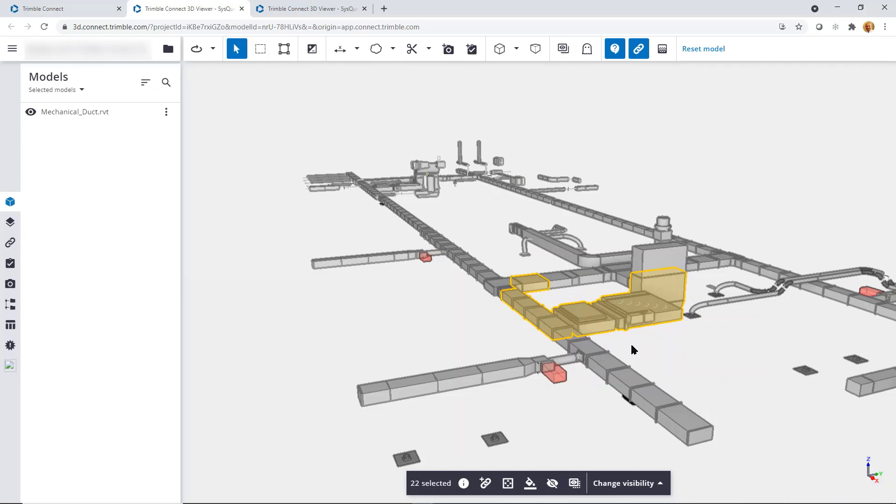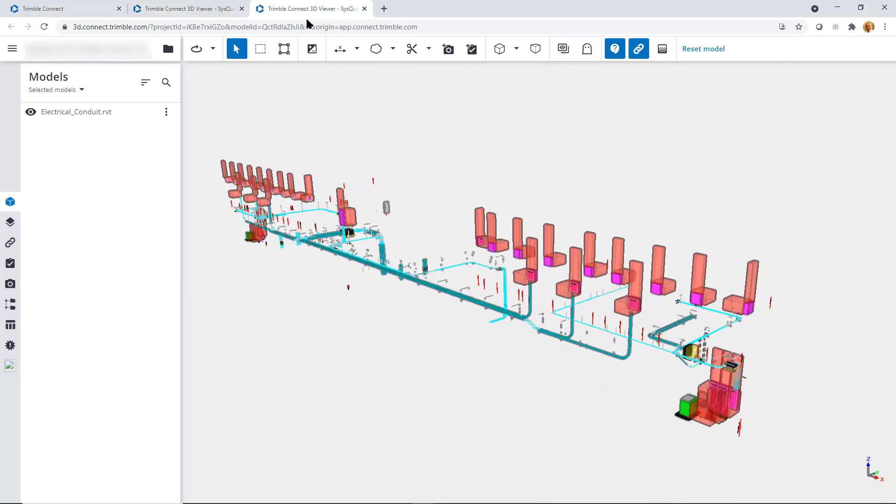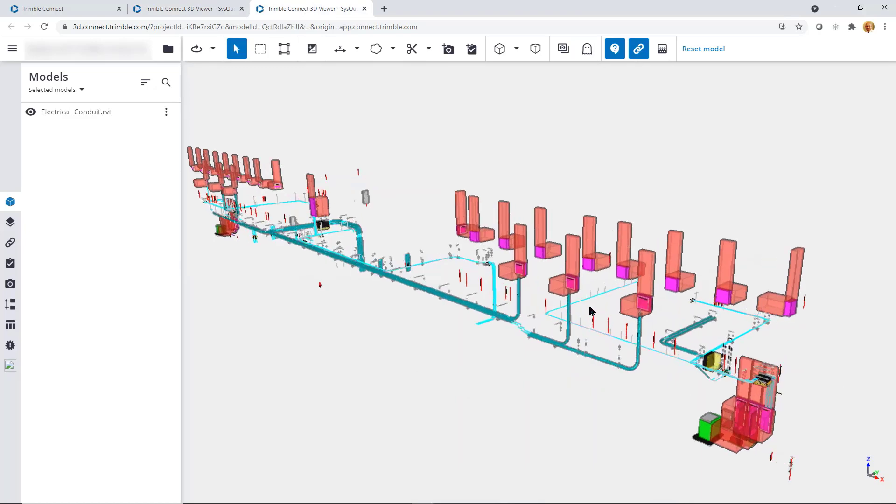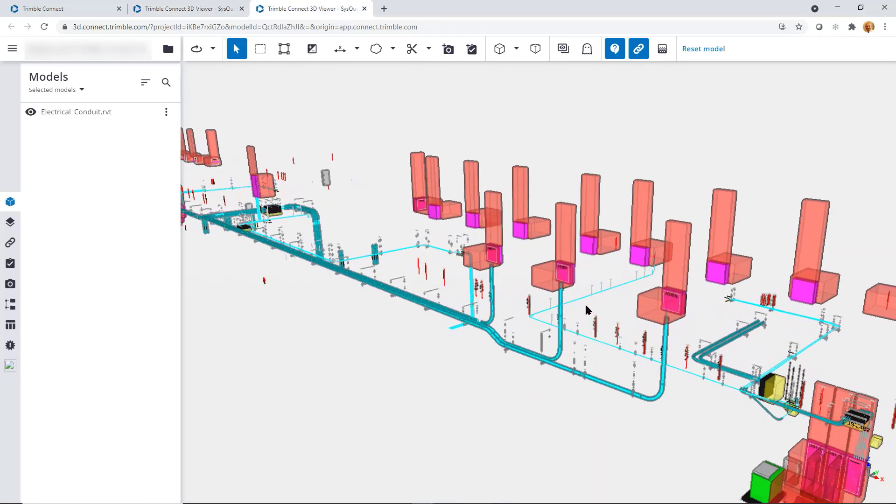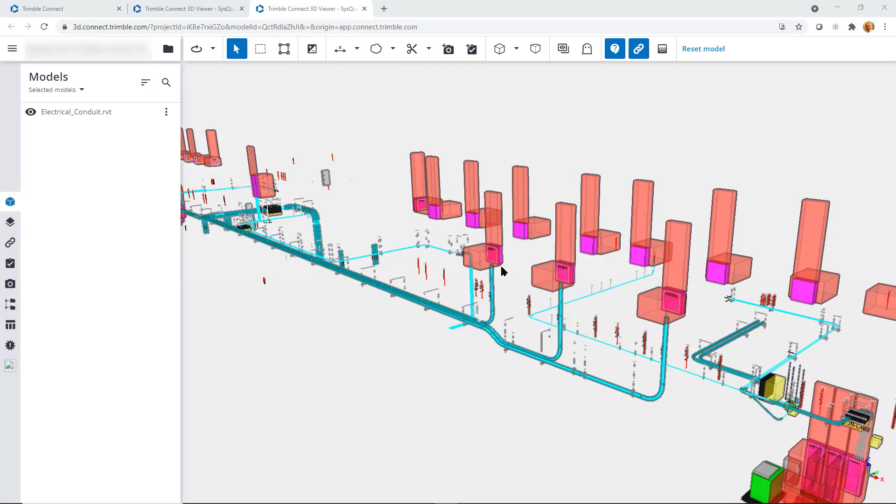It will work the same whether it's mechanical, plumbing, or electrical. You have these capabilities. You can even compare two models to help identify what may have changed in a new version or addendum.